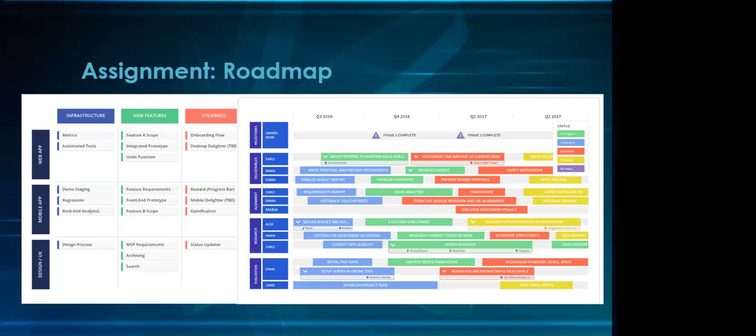So it would be more of the feature level, whereas when you're looking at the deliverables, you would then look at, okay, in terms of my PBIs, what is the actual work that's going to be done? So in my homepage, I'm going to have all the menus done. The menus include the about us, the contact us, the shop features. My footer includes contact us, etc., etc. Okay, I think it's getting there now. Yeah, it's getting there.